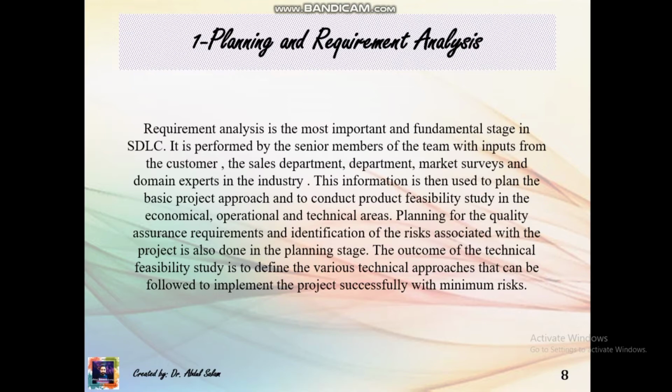The planning for the quality assurance requirements and identification of the risk associated with the project is also done in the planning stage. And the outcome of the technical feasibility study is to define the various technical approaches that can be followed to implement the project successfully with minimum risks.